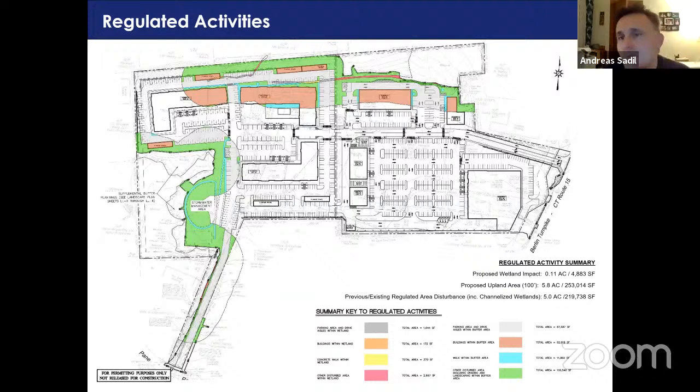So, Mr. Hinckley, would that be a condition if we move forward with this application? Would there be a maintenance plan as a condition of acceptance of this permit? If one was not provided, you could make it a condition. If they choose to provide one in a subsequent submittal that you can review, you could just give them the standard conditions, and that maintenance plan would be a part of the set. So that's something that they could do going forward, certainly, or you can condition it.